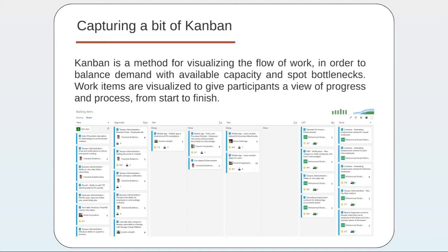This is the dev doing column and dev done column, and this is the test column, test doing and test done, and then the user acceptance column. At a glance, anyone can say that these PBIs are in the development stage, those PBIs are in the testing stage, and those PBIs have already been finished but not user acceptance tested. Likewise, looking at the Kanban board, we can get a clear idea of what the project is going through at a certain point in time. So instead of the daily stand-up meeting, this is what we have in a Kanban team.